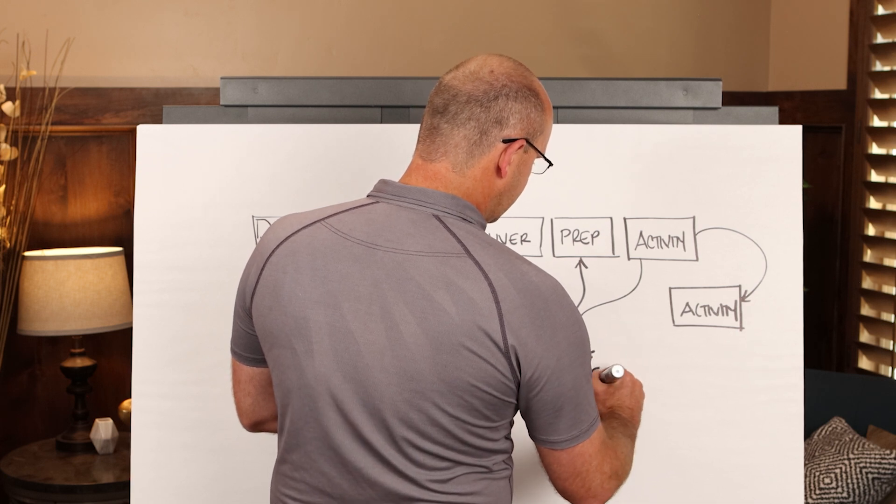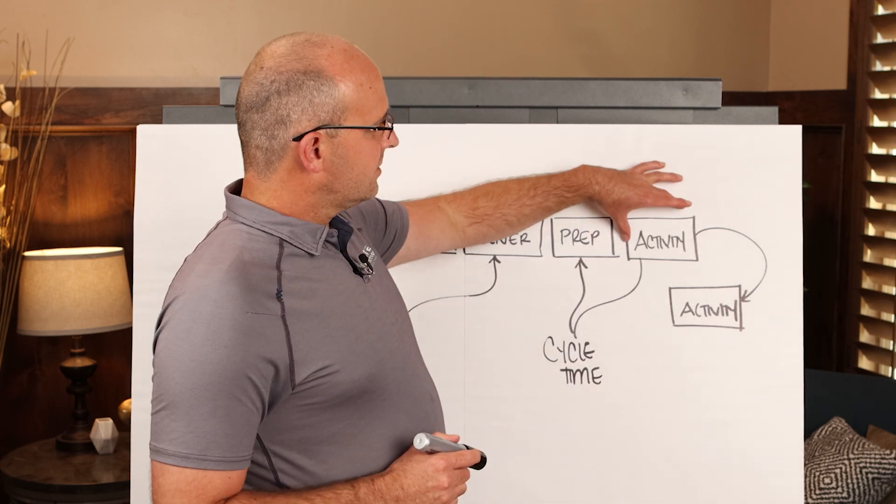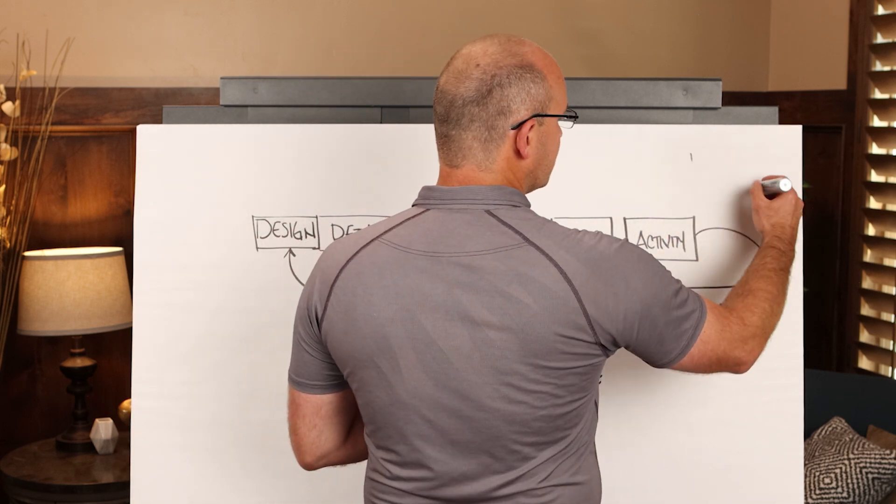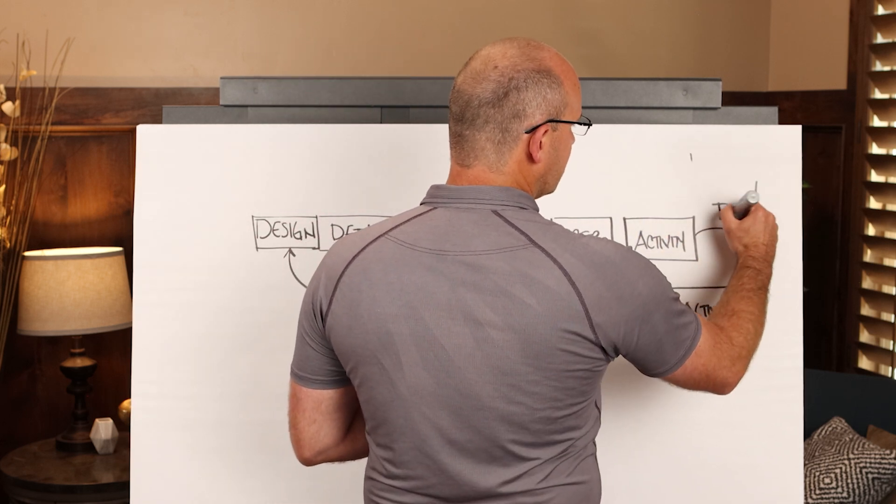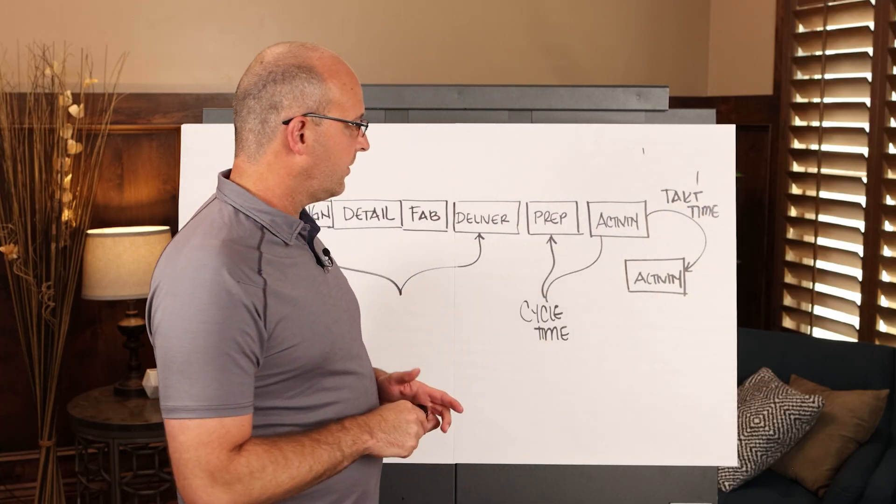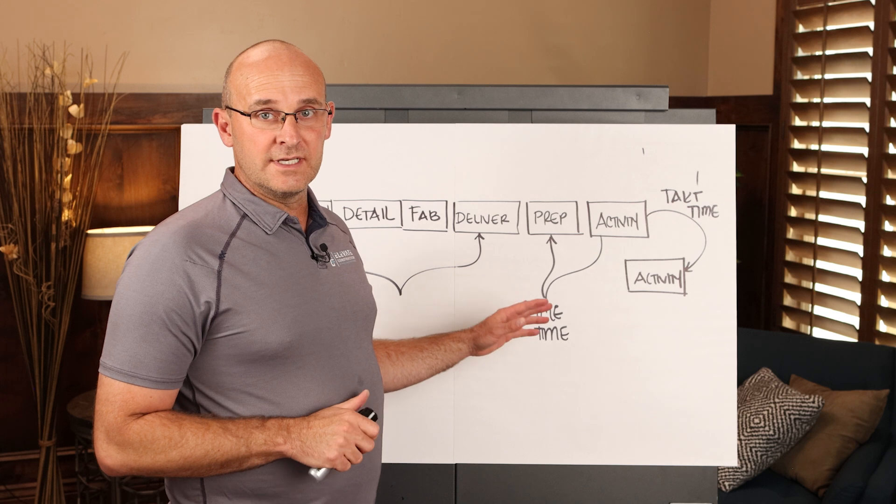The tack time is when you are producing multiple activities on a rhythm. The tack time is the rate of production. Okay. That meets the customer demand and sets the overall pace. So these are two very different things.